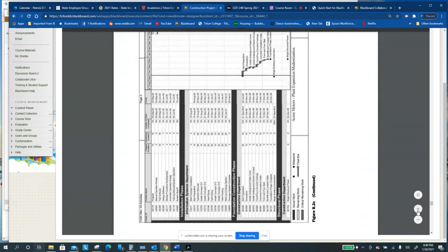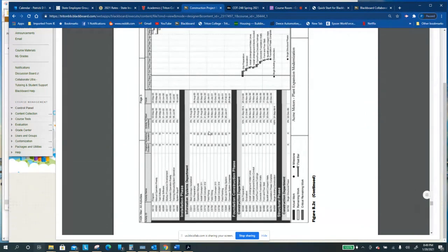So your original duration, your remaining duration. You might have started a task and you're 2 weeks in and you have 4 days left, whatever it is. Activity complete, or a count of that, the percent of that activity, how far you've progressed through it, how much is left. And then simple stuff, your start date, your end date. Usually on schedules, you're talking about work days, so you're not including weekends unless it's overtime work, stuff like that.